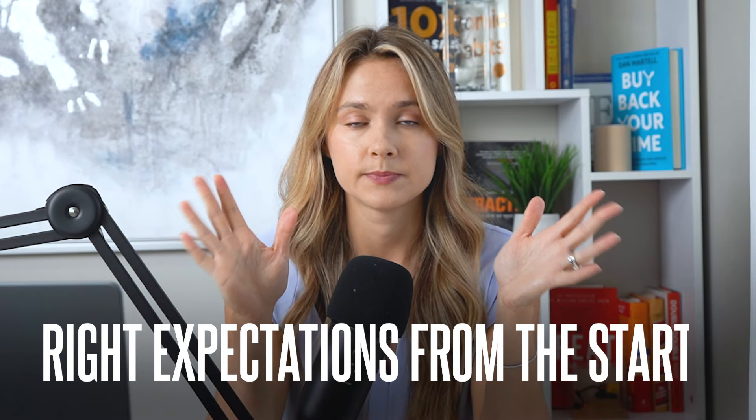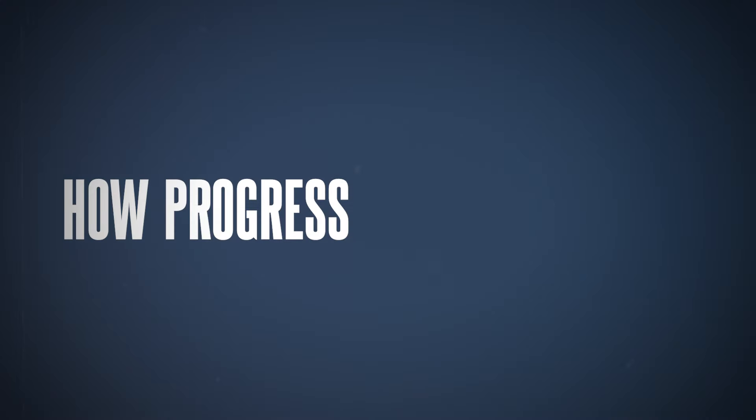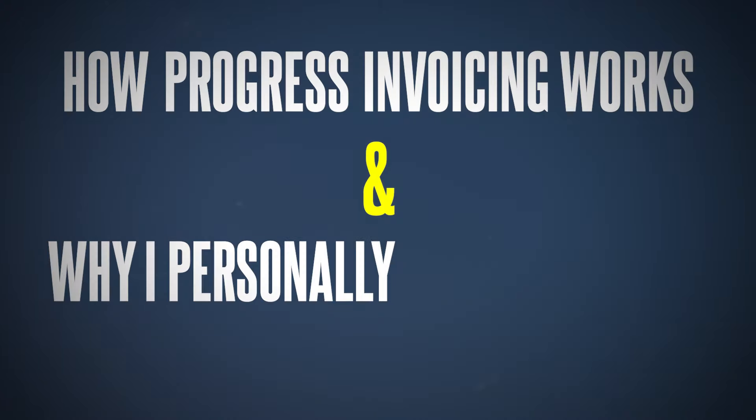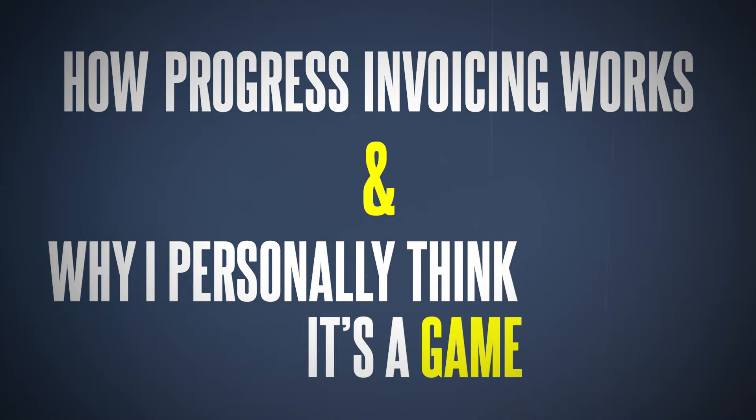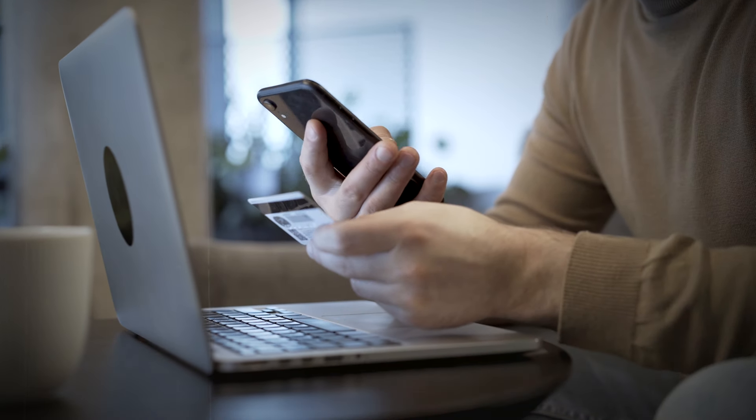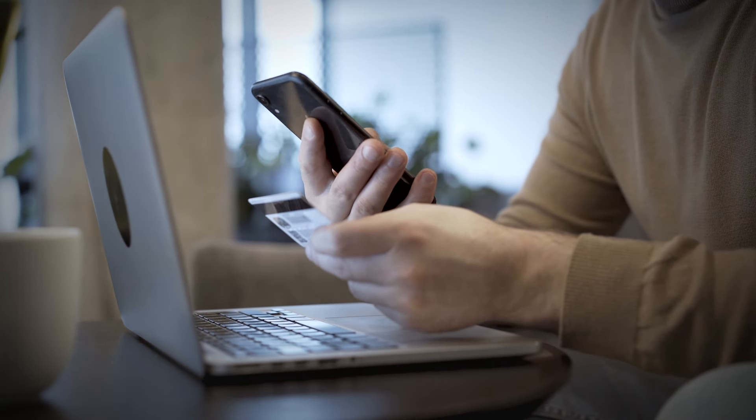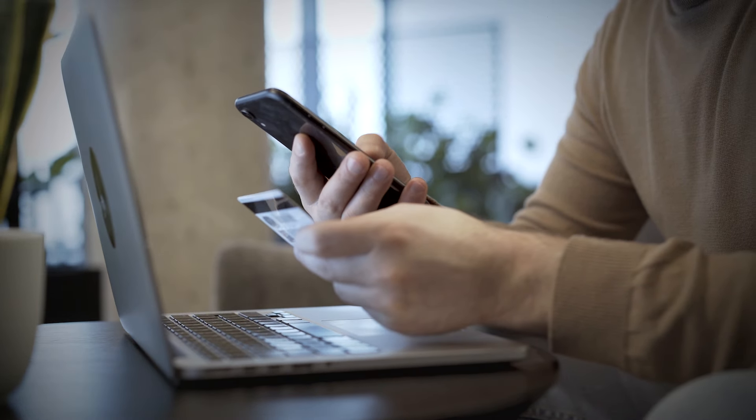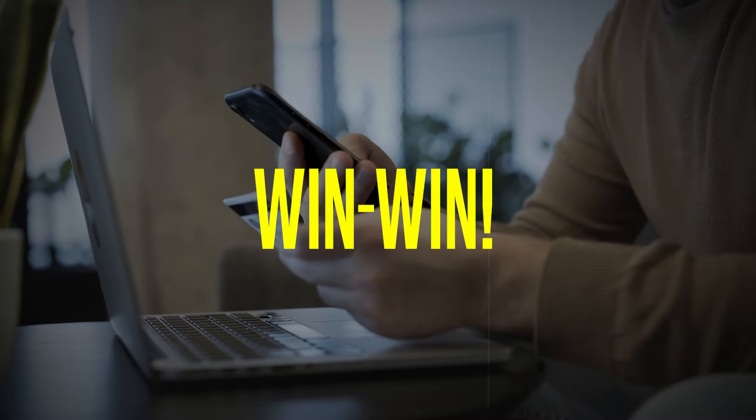Up next, I'll show you how progress invoicing works and why I personally think it's a game changer. Once the project's approved and you've started the work, you don't want to wait until its completion to get paid. This also lessens the financial burden from your customer because they're able to essentially pay you in installments as the project progresses. So it's a win-win. Progress invoicing lets you invoice for work as it's completed, so your cash flow stays healthy throughout the project.